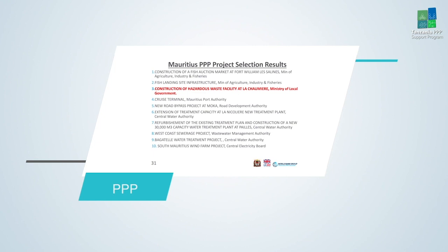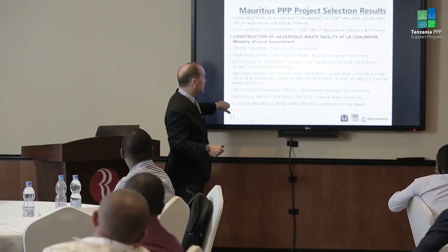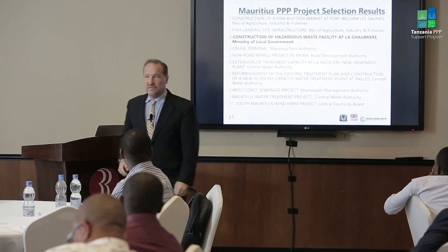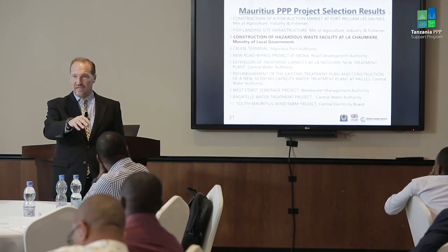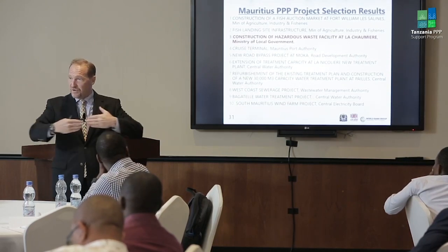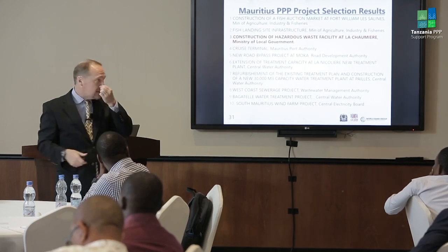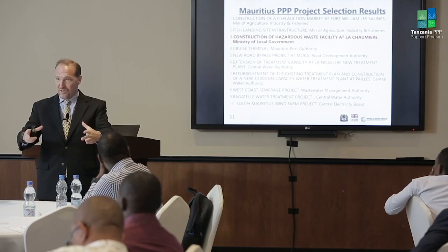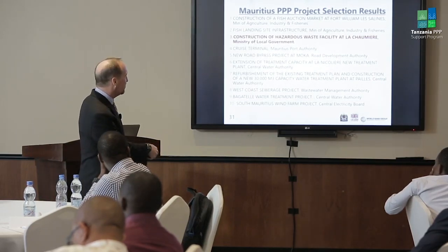And you'll see other sectors here, including ones for wind energy, as well as a wind farm, as well as even a road project, which was an unsolicited proposal. There was a private landowner who owned land that would be ideal for a connection road, would relieve congestion between 2 points. We said, okay, let's at least evaluate this, but you can only negotiate with the current landowner. So that's what made it an unsolicited proposal.